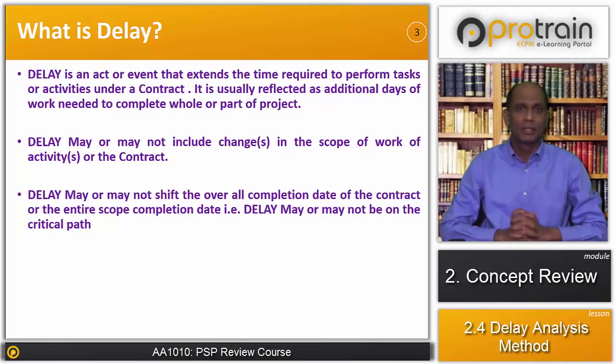It is possible that the utility work is delayed, but the overall project is completed within the project duration because there was float built into the utility work activities. However, we are definitely going to say that there is a delay in utility works, while the project completion remains the same.